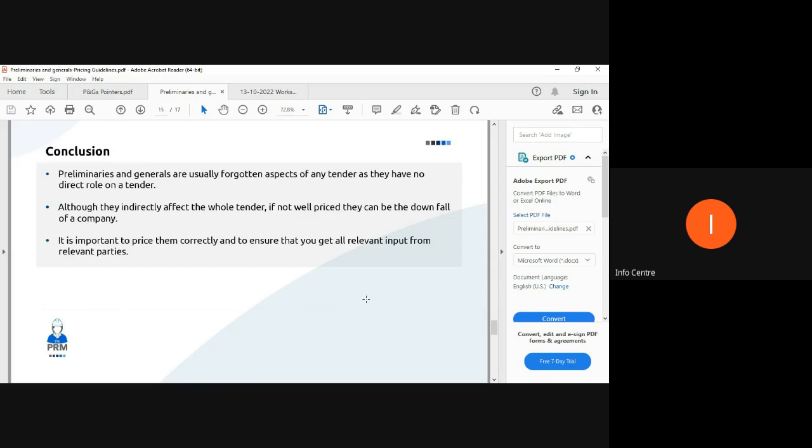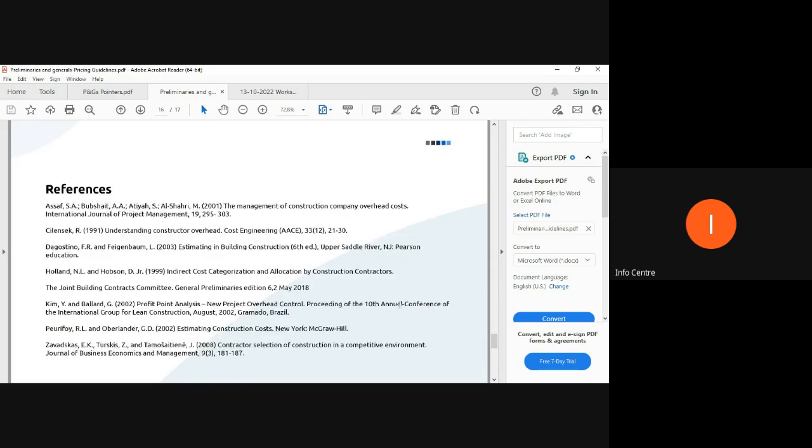For insurances, it can give you guarantees. It can give you all risk insurance. It can give you third-party protection. It gives you COIDA protection. All of that in one quick quote, directly from the system. Then you know how much you're going to pay. From then on, you add your profit margin, and therefore you can price the item under insurances. As simple and as easy as that. However, if you miss it, then you are in trouble. So I think that brings us to the end as it relates to P's and G's.